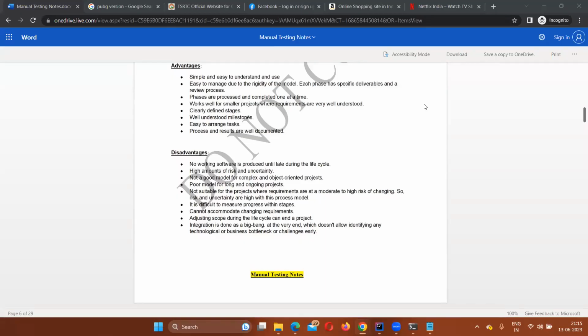You can never really say that the application is fully developed, but in whichever phase you take the application, let's say after phase 1 or phase 2 or phase 6, or after 5 iterations or 10 iterations, the application will still be functioning at any point in your life cycle, at any point in your incremental iterative model. After the end of any iteration, the application is usable, ready to use, and can be released. It's not like your waterfall model where the entire application should be ready, only then you are going to deploy or release the application. That's not the case with your incremental iterative model.